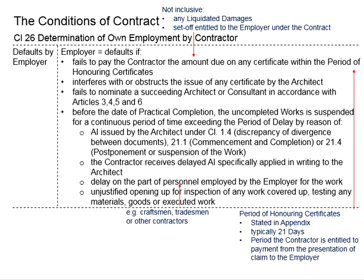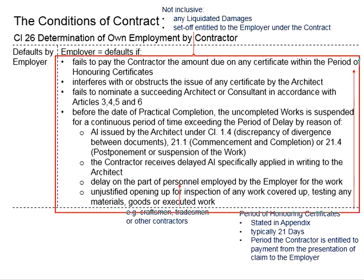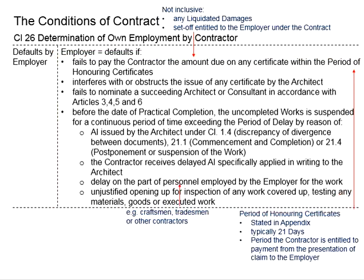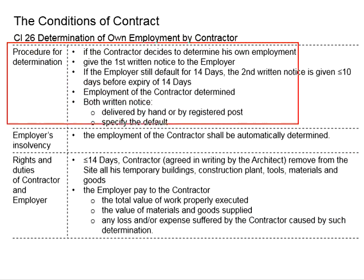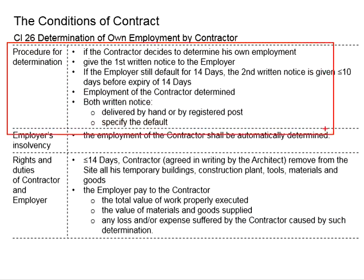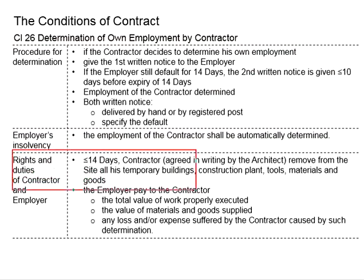With that, the contractor can choose to withdraw himself from the project. This is of course on the basis that the employer actually defaults. There is a procedure for this determination of own employment by the contractor, as well as the things to be done by the employer and the contractor after the determination.